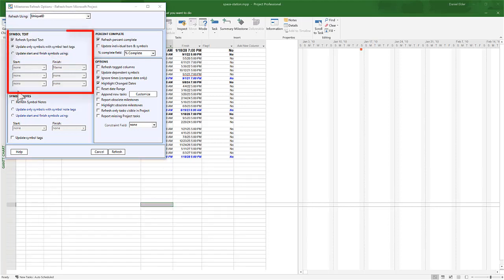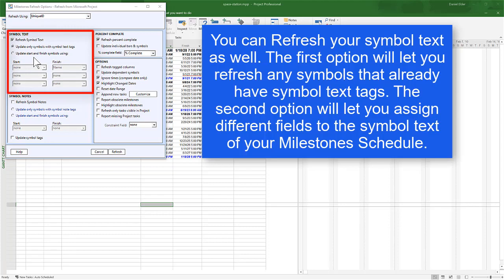Below that, you have the Symbol Text section. You can choose to refresh your Symbol Text if you'd like. There are two ways to do that. First, you can update symbols that already have tags. So for instance, if a Symbol has the Name field of that task, the text would be updated on your Milestone Schedule if the Name field in Project was changed.